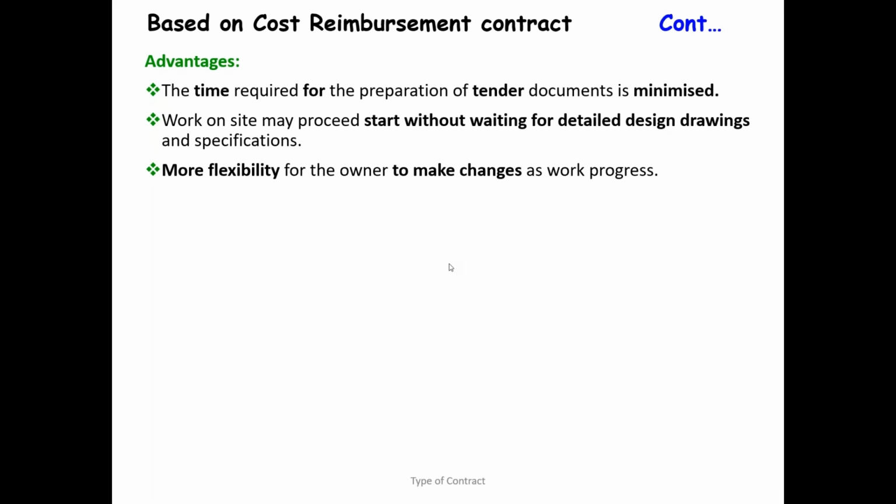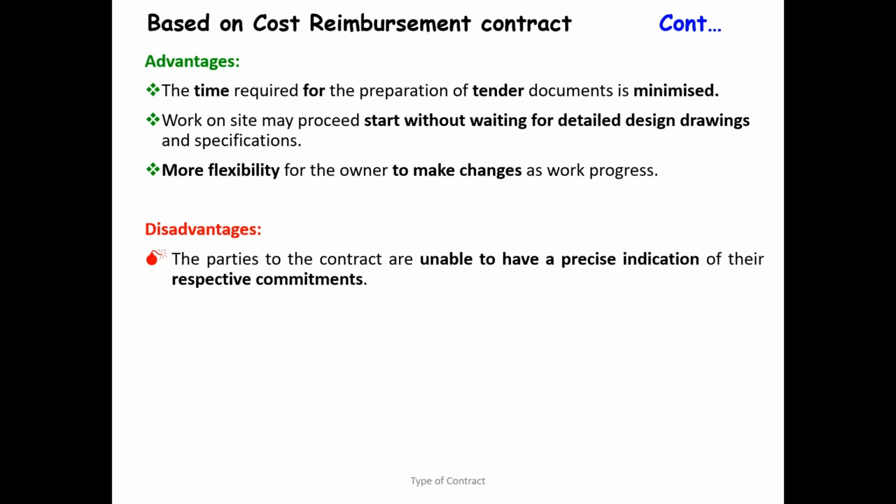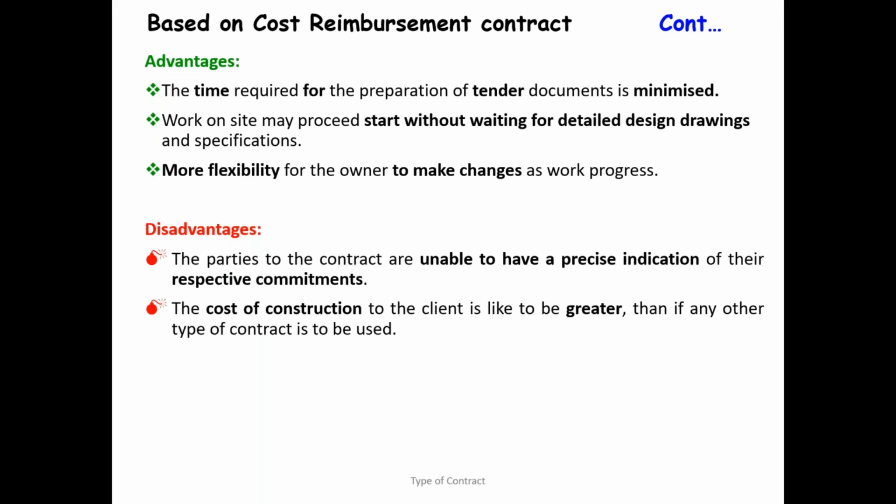Okay, changes are very easy. With the overlap of the design and construction, there are so many advantages. But when it comes to the disadvantages: no clear commitment, no cost certainty, no time certainty, right? The cost of the construction is very high. Waste of resources will be very high.